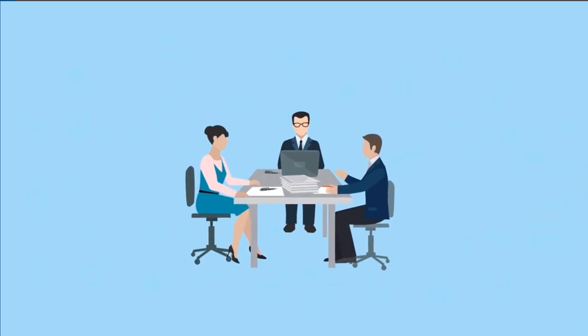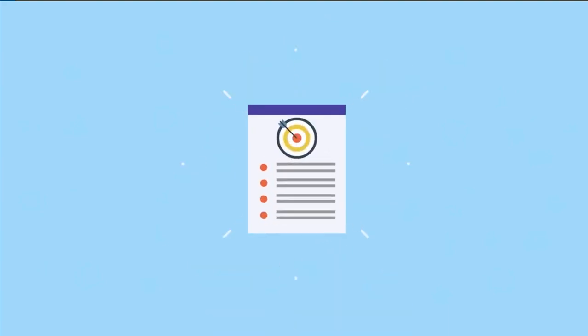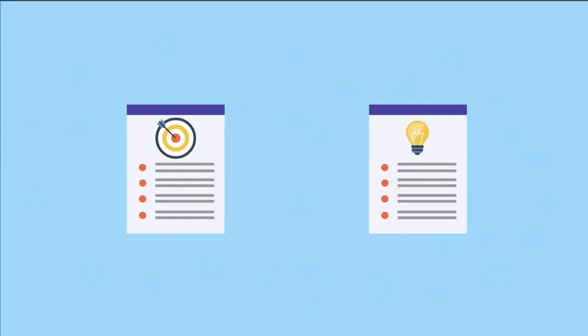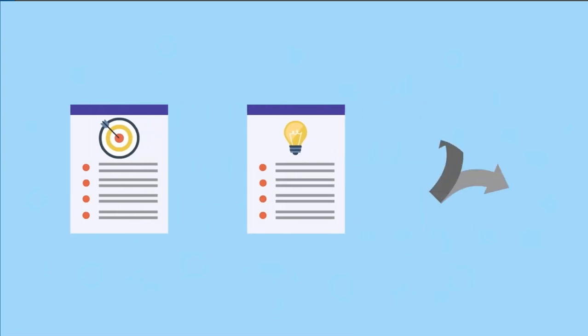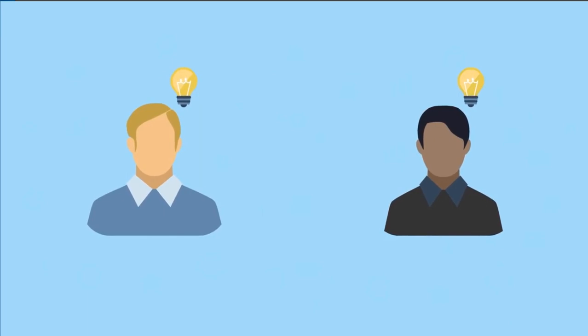There are 4 basic rules to follow when brainstorming. First, you identify your objective or problem. Then you record the ideas generated. The third rule is to make sure the session stays on track, and the final rule is to build on one another's ideas.